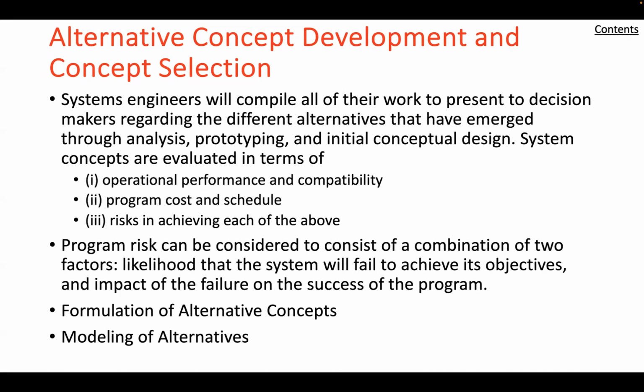Program cost must be derived from the system lifecycle cost, which in turn must be derived from a model of the complete system lifecycle. The appropriate relative weighting of the near-term versus long-term cost depends on the financial constraints of the acquisition strategy. Specific cost drivers should be identified wherever possible. The appropriate weighting of schedule requirements is program dependent and may be difficult to establish.